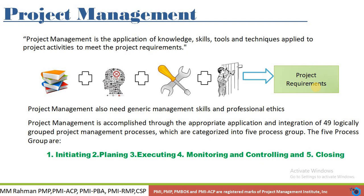Project management consists of 49 logically grouped project management processes that are interlinked with each other. These 49 processes are organized into five process groups: Initiating, Planning, Executing, Monitoring and Controlling, and Closing.